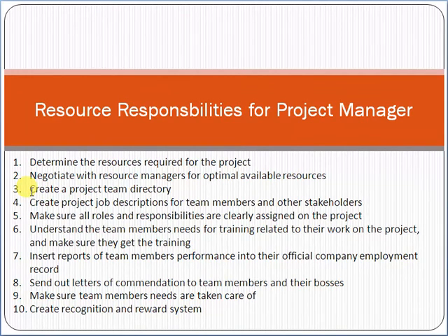Create a project team directory. Project team directory means, friend, who the resources are, who will be working on the project, what their contact numbers are, what their roles will be, what their contact information is, etc. All these types of directories should be created by the project manager.